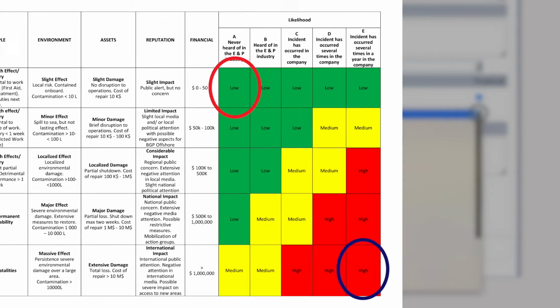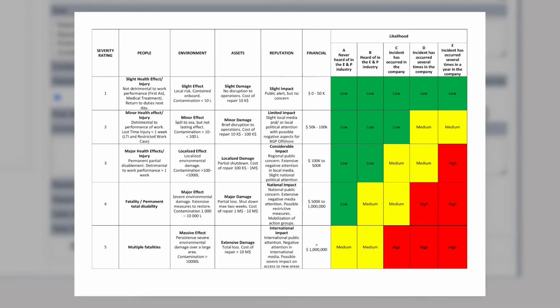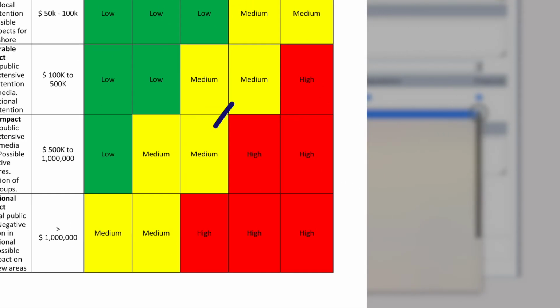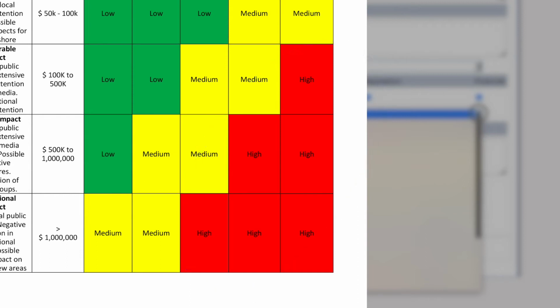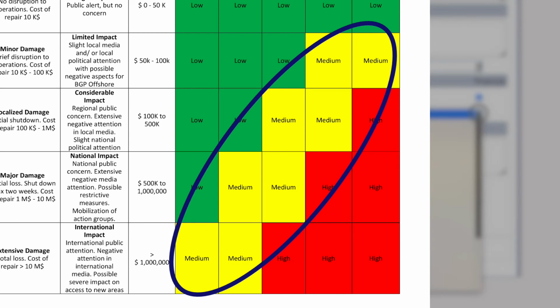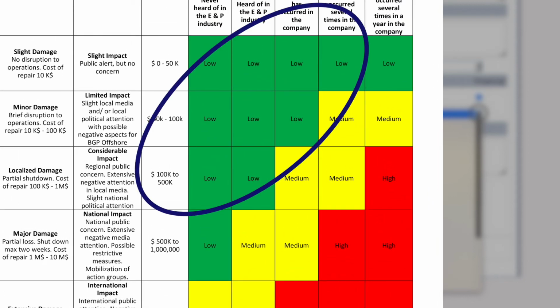The purpose of risk evaluation is to assist in making decisions based on the outcomes of risk analysis about which risks need treatment and the priority for treatment implementation. Red, intolerable. The operation should not start or continue until an alternative method has been developed or additional controls have been implemented. Yellow, incorporate risk reduction measures. The operation should start or proceed only when risk-reducing measures are in operation or with specific sanction by management. Green, manage for continuous improvement. The operation may start or proceed with continuous effort to improve.